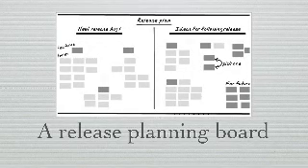This is a release planning board, which looks like a whiteboard sketch. So you have a release plan. You say what happens till the next release, when your next release is, what the featured stories of the current release are, what the ideas for the following release are, and in the far future, what stories you are planning to include. All these are included in the release planning board.